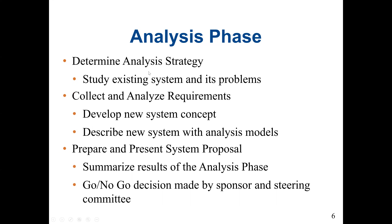In the analysis phase, we determine the analysis strategy. If there is an existing or manual system performing the same operation, we study that existing system and its problems. Then we collect and analyze requirements — both functional and non-functional. We develop a new system concept and describe it with analysis models. We then prepare and present a system proposal, summarizing the results of the analysis phase, leading to a go or no-go decision made by the project stakeholders, such as the sponsors or the steering committee.